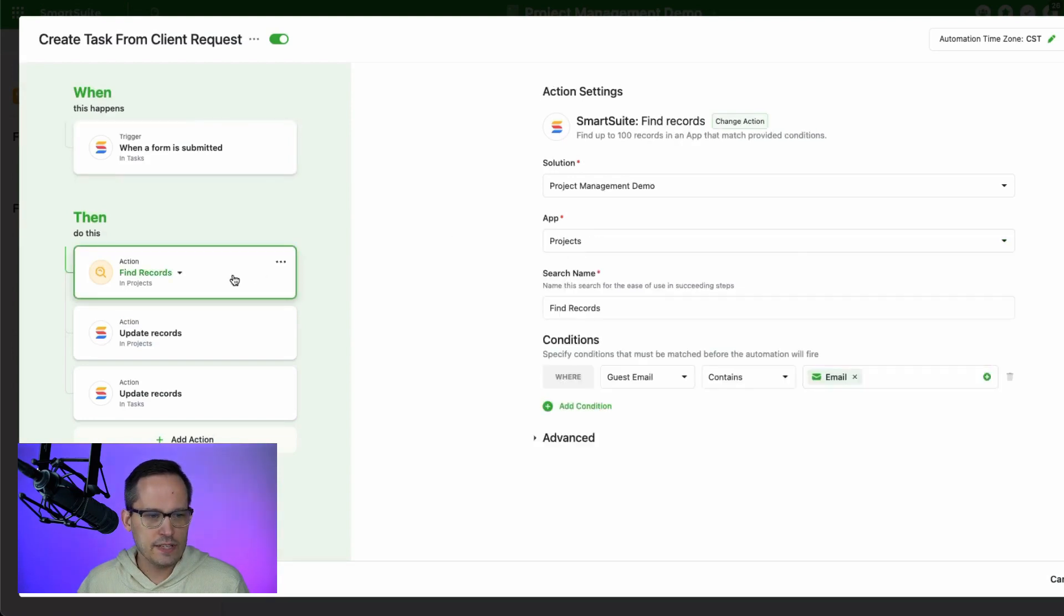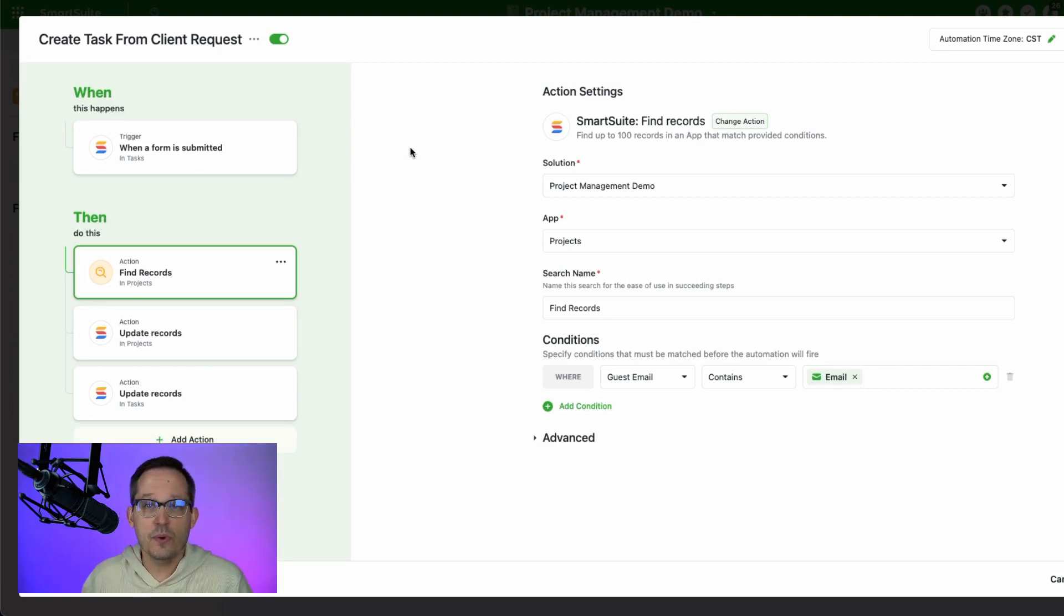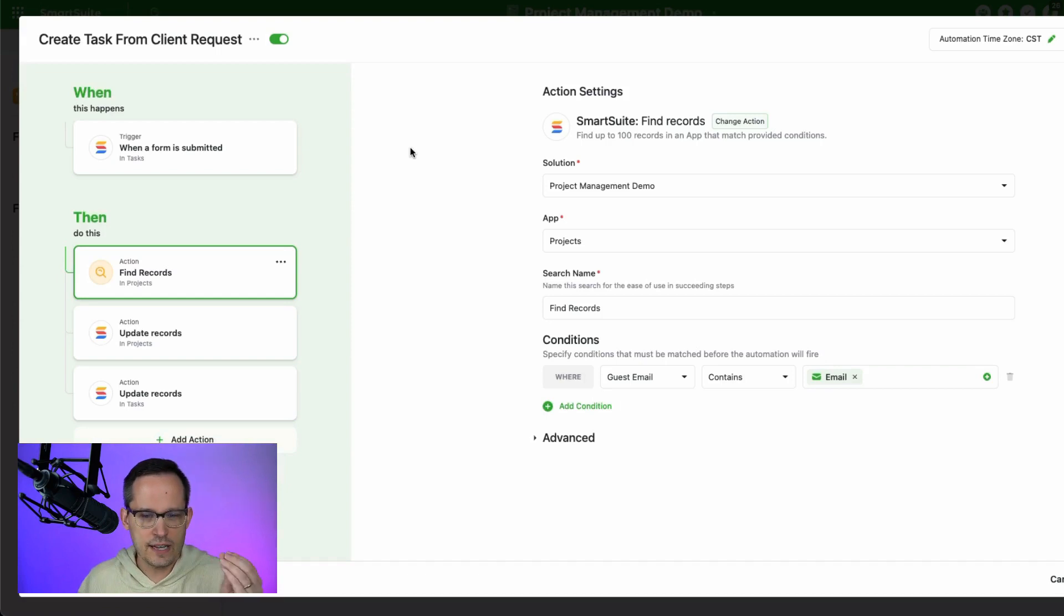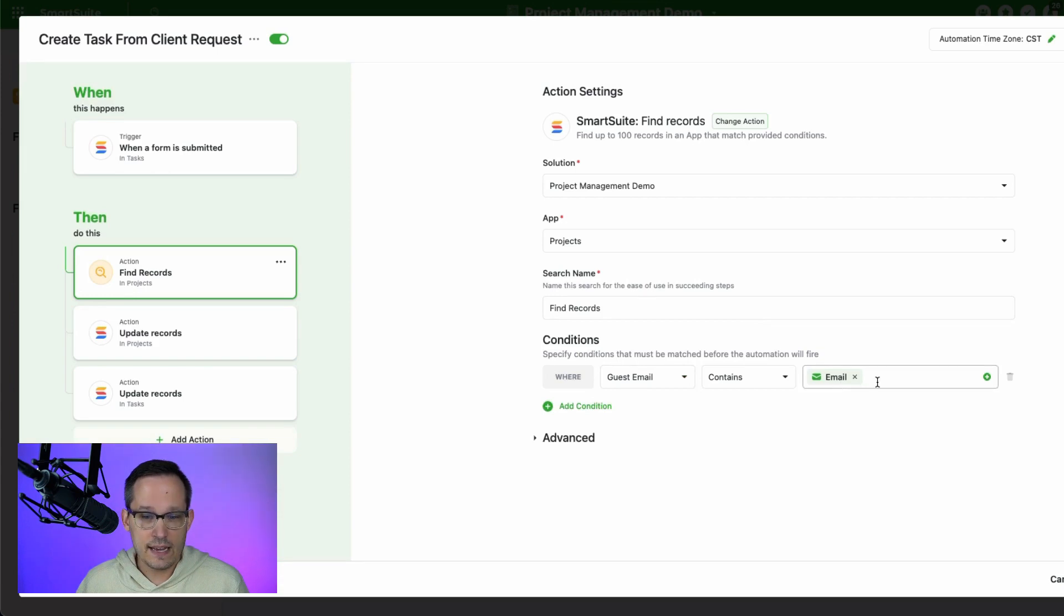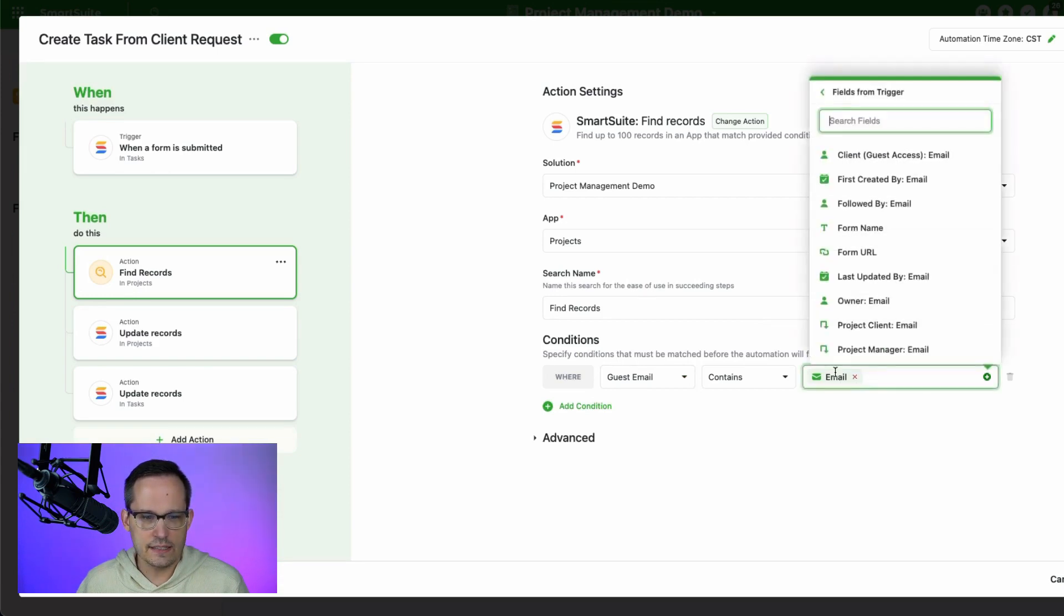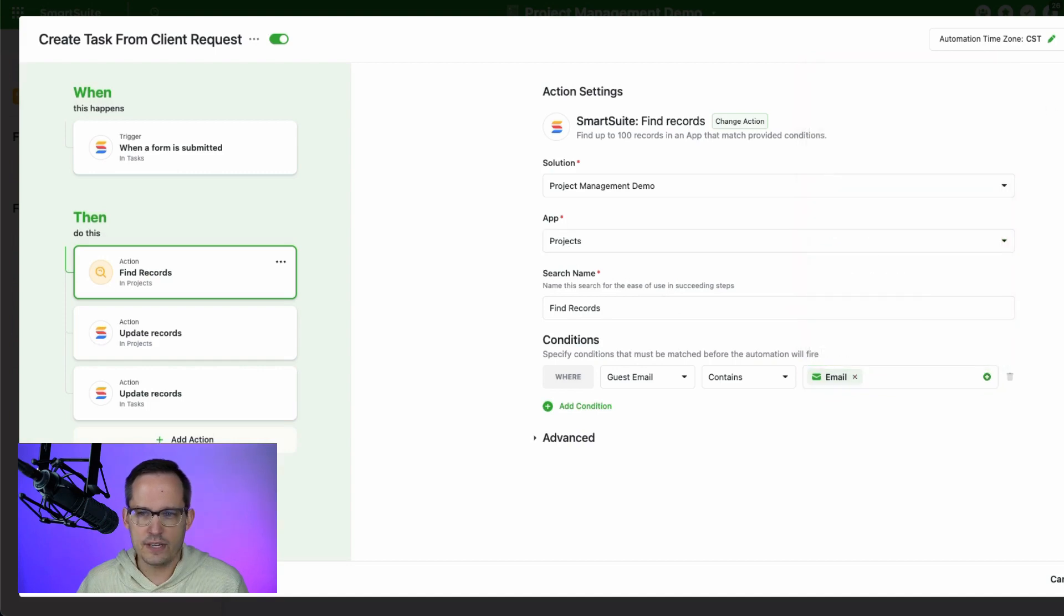And the first thing I want to do is to be able to find the appropriate project record because we want to link the task to the project for that client, which takes a little bit of trickery here. So what I'm doing is I'm saying where this guest email contains the email address from the form submission itself, and this is searching for that for the projects.